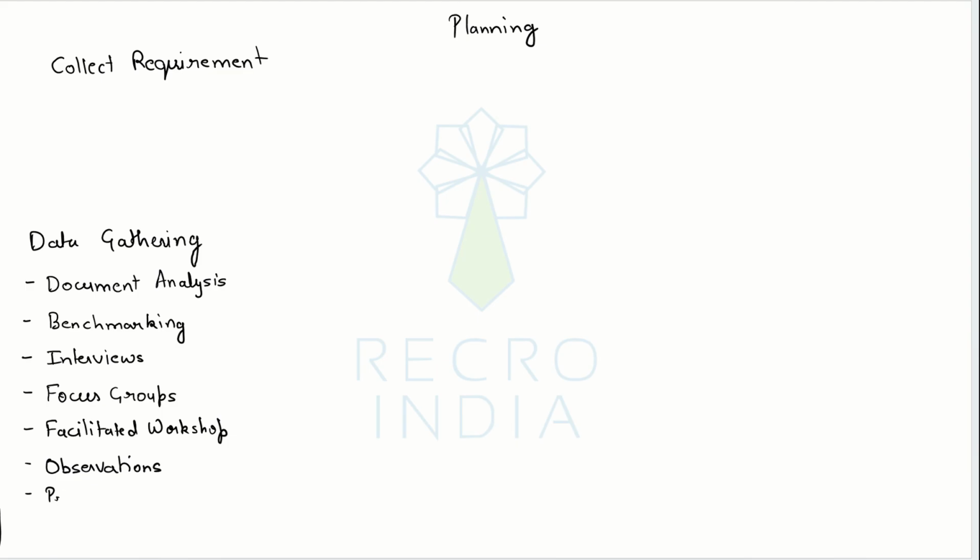Then we can also rely on prototypes. Once we have done the first round of requirements gathering and we want to further refine our requirements, that's when prototyping will help you. Let's suppose we are in a project to construct a big shopping complex. Before we break ground or start the construction in full swing, we will want to have a prototype created just to get everyone's confirmation that yes, this is exactly what they are looking for and this is how the final output will look.